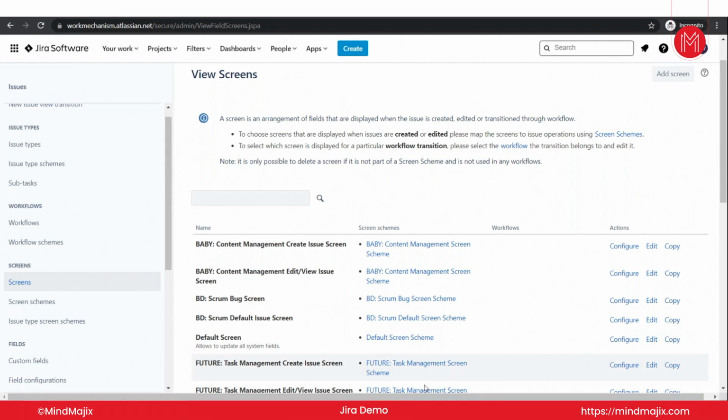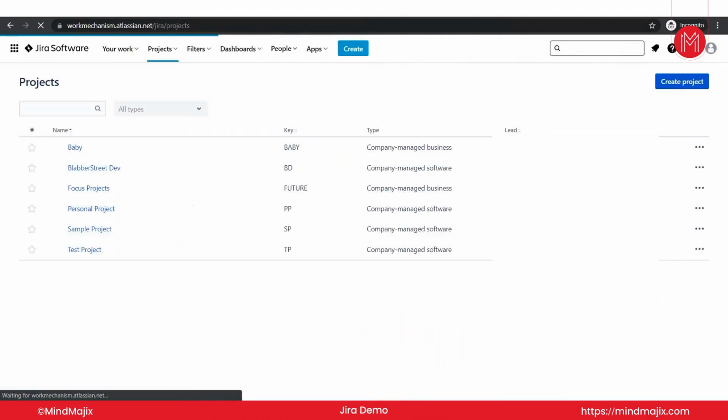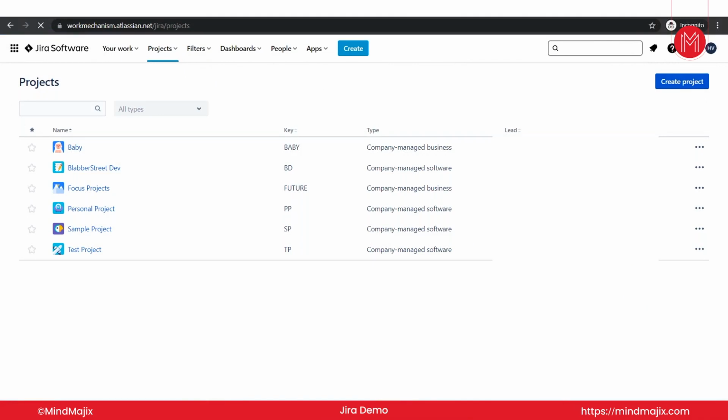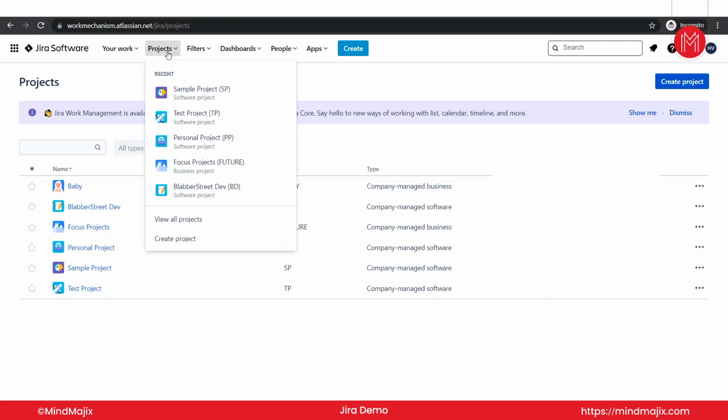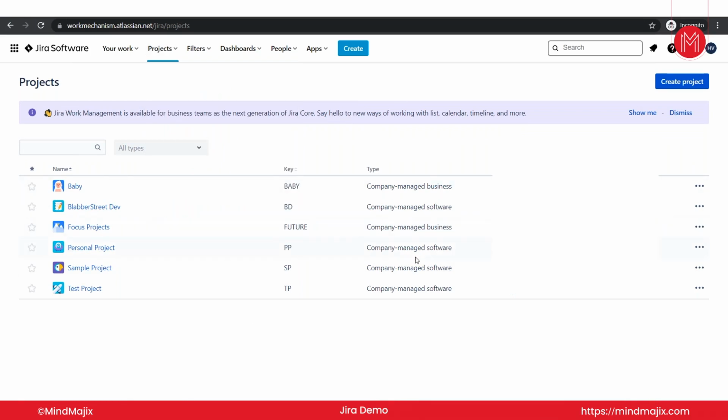I will take you through some important aspects of Jira. How to create a project is something that we can look into as a beginning to start off with. As I told, Jira is a project management tool, and you can create different projects in Jira. There can be n number of projects that you can create. So to create a project in Jira, what are the first steps that you will do? You will click on the projects option at the top bar, and you will click on view projects. Once you click on view projects, this is the area you will come into.